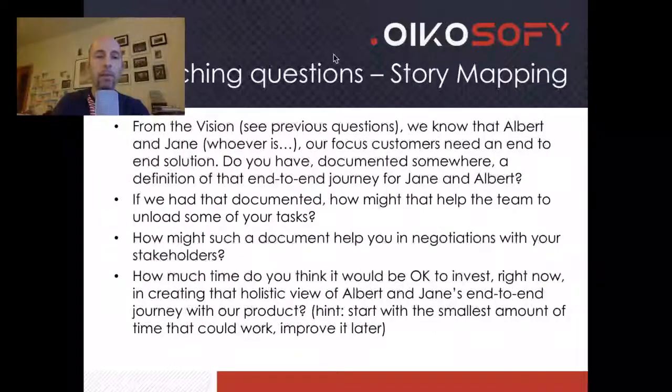In the story mapping stage, we are focusing on going from vision, the overall direction, to a concrete set of tasks, user goals, and of course user stories, a backlog that we can give the team. So for example, let's assume that there is a vision, and we list the names of the customers in that vision. We might ask, from the vision, we know that Albert and Jane, whoever they might be, our focus customers, need